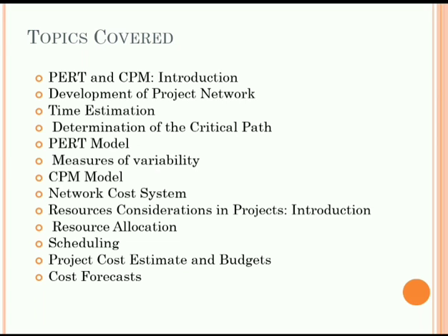The inputs of the plan quality management include the project management plan, stakeholders register, risk register, then requirement documentation, enterprise environmental factors and organizational process assets. All these things you have to include while giving the input when making the project management plan. You have to give all the information regarding all these points for the purpose of maintaining the plan of the quality management team.